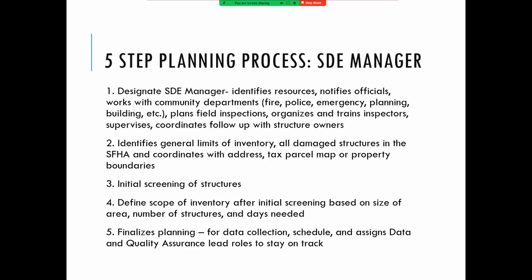And then, based on your scope, after you've determined that and the number of structures and everything, what kind of timeline are you working on? Because as I said, you want to get them done as soon as possible. And so we need to have target dates set and maybe put some milestones in there to make sure we're making sufficient progress, because like they said, people want to try to recover and rebuild as fast as possible, which means they might not want to wait for an assessment, the final determination, and get the permitting, which is part of the requirements.